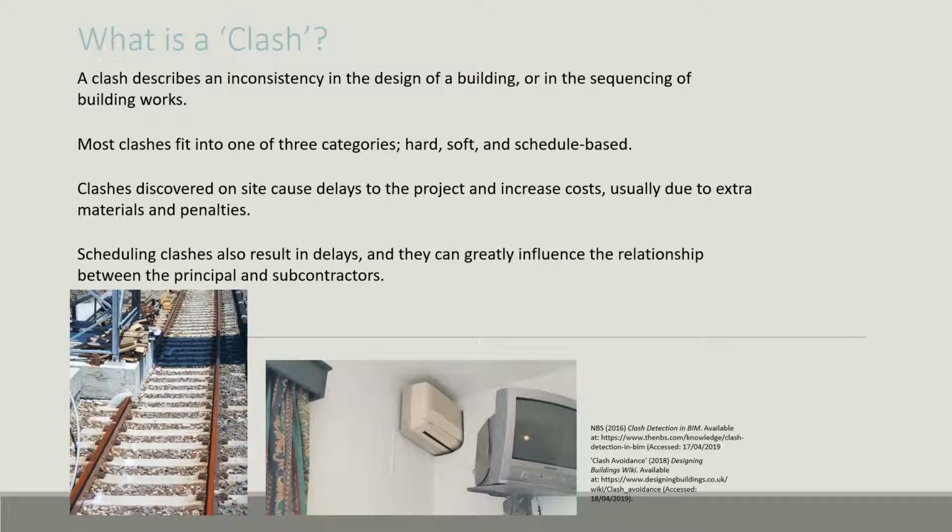Scheduling clashes also result in delays and can greatly influence the relationship between principal contractor and subcontractors. If a subcontractor arrives on site and they aren't required to work yet due to a scheduling clash, the subcontractor may choose to not do any work for the principal contractor again. Worse, it may breach a contract and result in penalties for the principal contractor. Clearly, clashes have a huge impact on the success of a project. Successful projects should aim to detect as many clashes as possible prior to the commencing of site work.